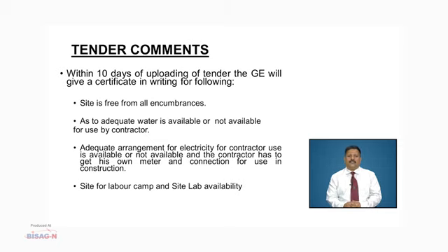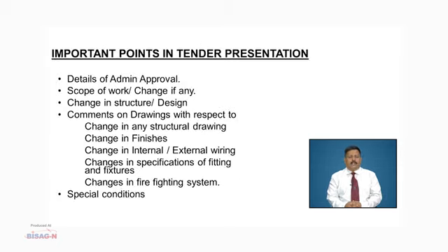He also has to justify and locate, as per the zonal site plan, the place for the labor camp and the site lab in the project. Usually site labs are considered for projects of 1 crore and above. Now, the important points which are considered threadbare in the tender presentation are details of the admin approval.